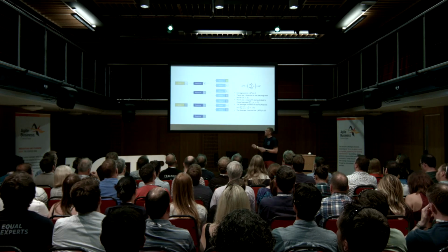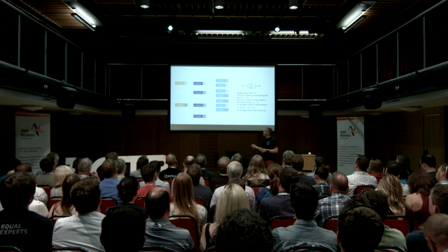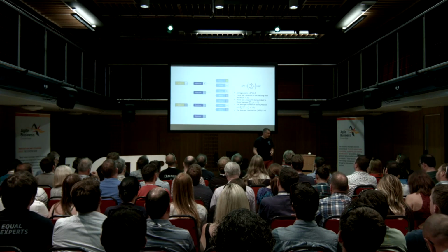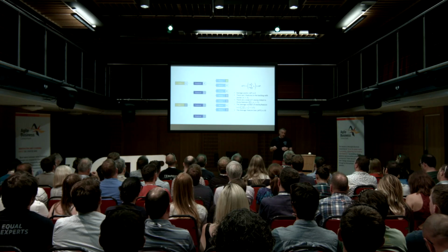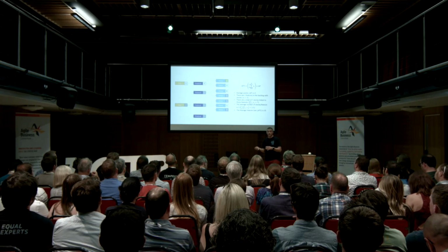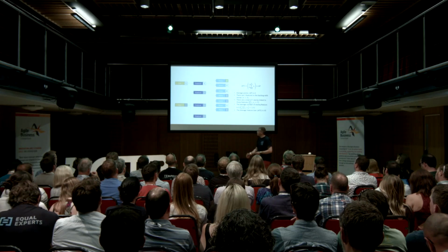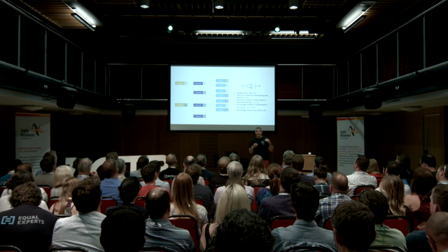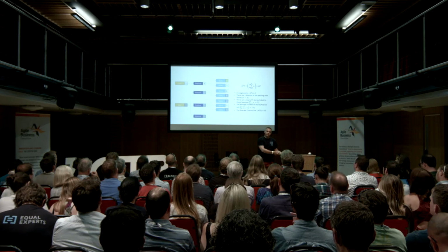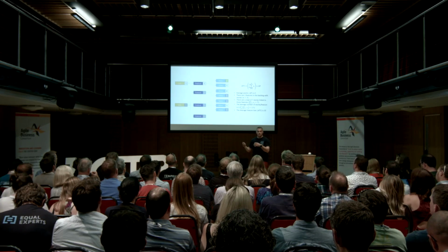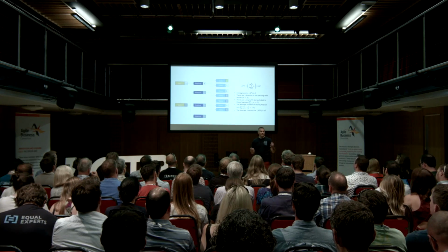So we'll look at the backlog. We've got 3 features in our backlog, and 7 stories across those 3 features. We work out the average, and the average is 2. So then we can say our average size for a feature is 2 stories, and the stories are 5 points each. So we've got 10 points for a feature.